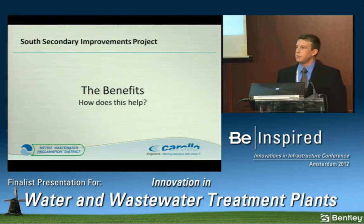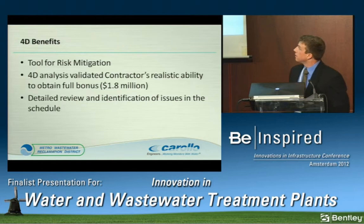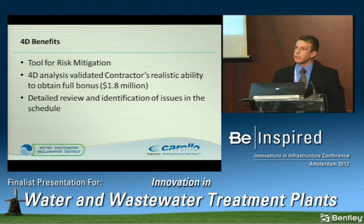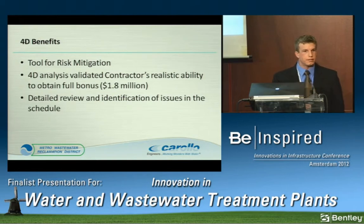So that was cool, but what really did that do for us? How did we make anything of what we just saw in that AVI file? Well, I'm glad you asked. The 4D's benefits are really a tool for risk mitigation. When we linked the whole thing, we were able to push play and validate the contractor's realistic ability to obtain that full bonus, to obtain the contractual scheduled time.